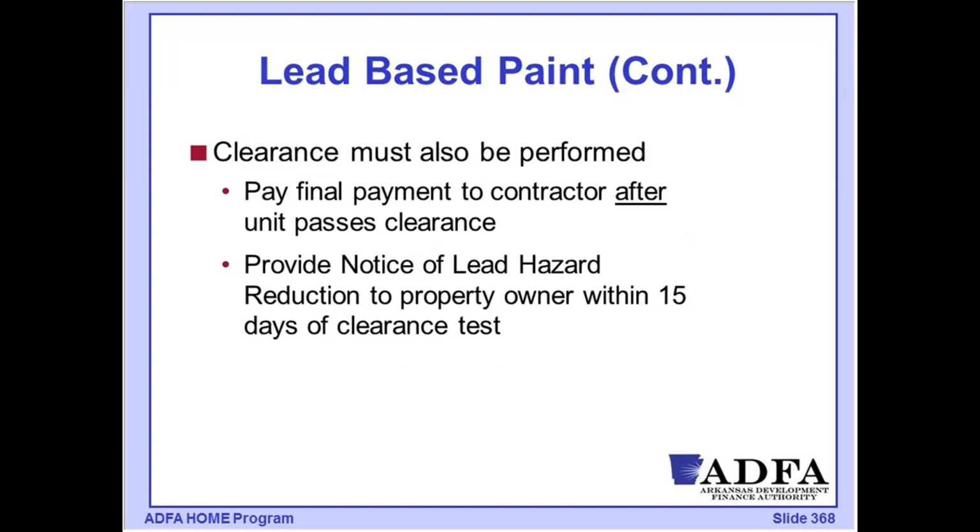So as part of this, once that work has been completed, we're going to do a clearance test. And a clearance test is essentially testing to see, have we gotten all the lead? Have we cleaned up adequately and removed all of the lead dust that might have been created as part of that process?